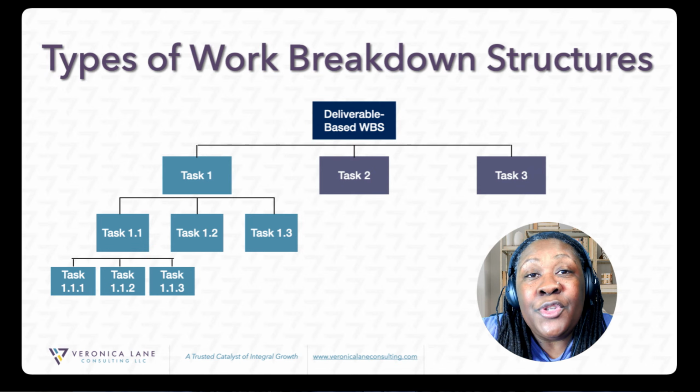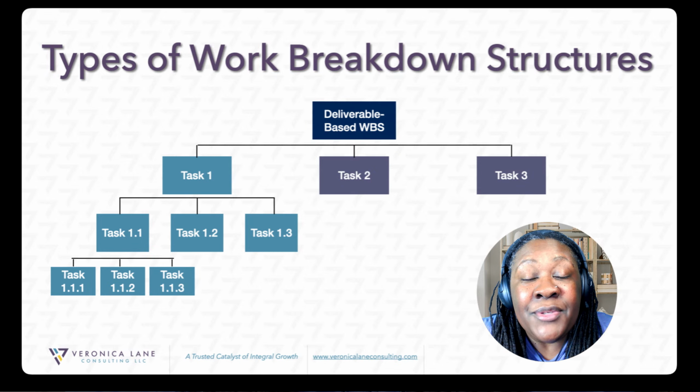Now, in project management terms, what I'm outlining is what is your time optimistic, what is your time pessimistic, and what is your time most likely, right? I'm going to ask the owners of task 1.2 those three questions, 1.3 those three questions, task 2, task 3, however many tasks we have. I'm going to find out who the owners need to be, and figure out how long it should take for us to do it.